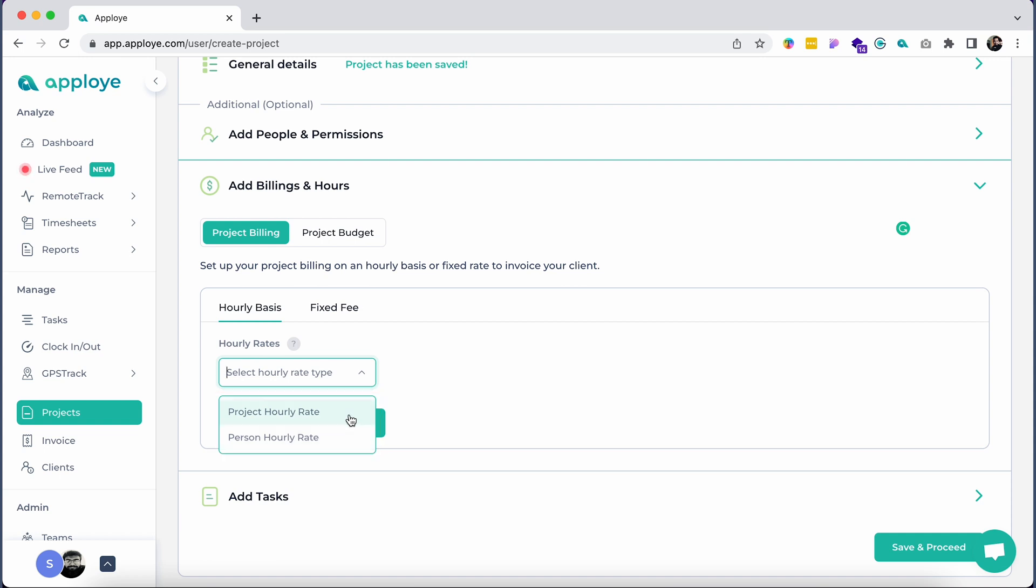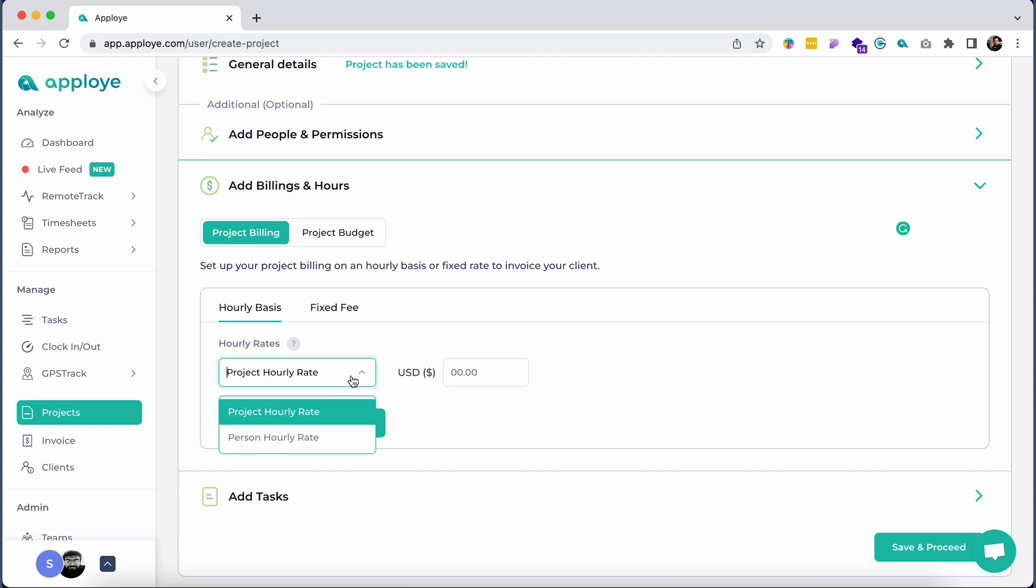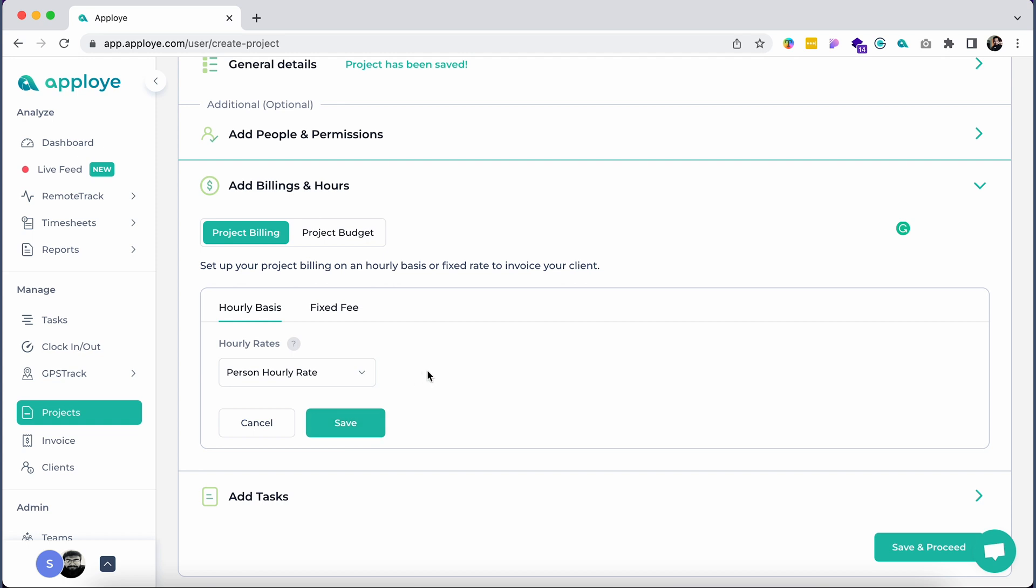Project hourly rate and person hourly rate. If you wish to charge your client on a single hourly rate for the entire project, choose the project hourly rate. If you wish to charge your client based on the individual bill rate of each employee who would be working on the project, you might want to choose person hourly rate.